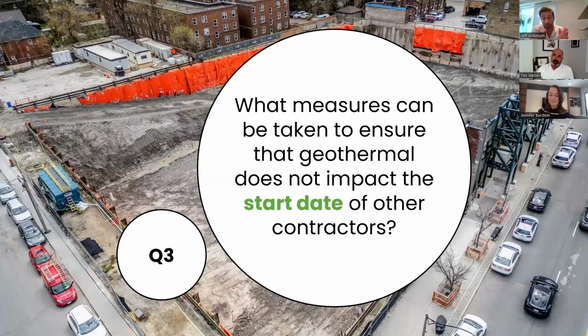I think it's like reserving time for geothermal. You've got to have the activities clearly in your schedule, and get the buy-in from the trades. Yeah, I think there's absolutely an opportunity for overlap. One of the things we've learned is no good deed goes unpunished. And we've kind of learned, especially with shoring, how much overlap can there be? And if you overcommit to that, it's a challenge and everyone's upset. We're tripping over each other. It's just too small of a dance floor sometimes for that many.